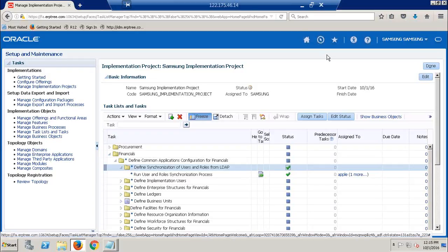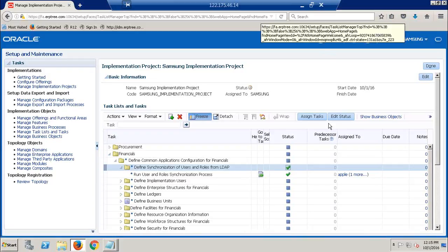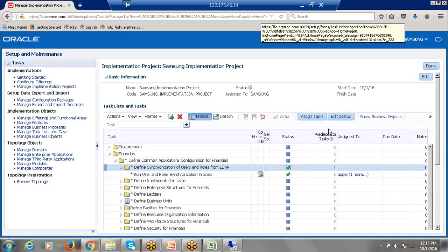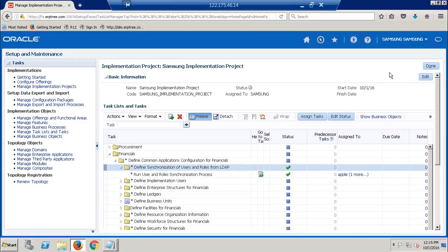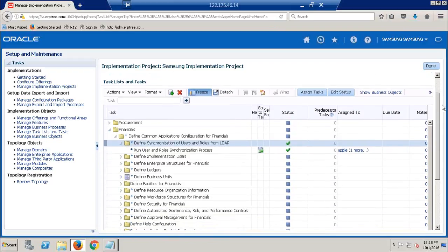Okay, I have one question here. Status is not automatic? No. Status you have to set manually. If you think you completed it as per requirement, then you can set the status as completed, so that it will be tracked at the project level, so that a manager or somebody can understand how much percentage of the tasks are completed in the system. That's it. It's not automatic, we have to manually update.